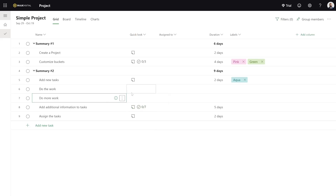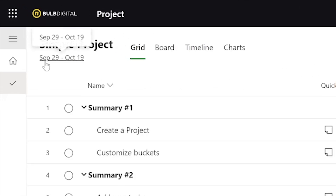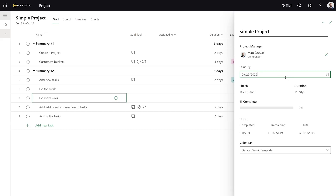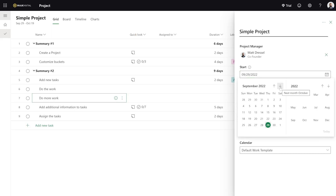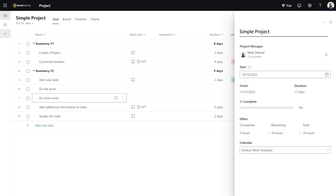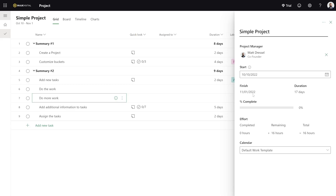Now that I've got a couple tasks in here, what if I want to look at when this starts? Up here you can see this says September 29th to October 19th — this is when this project is starting. If I click here, it's going to immediately open up the project details and I can manage that and set when this project will start and when it will finish. Currently it says the 29th, the day I created the project. I'm going to have this start — let's say two weeks from now, so I'm going to start on the 10th. And it automatically changed the finish date, because it knows how long all these tasks are going to take.